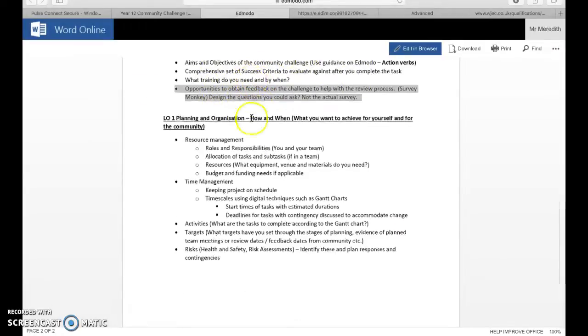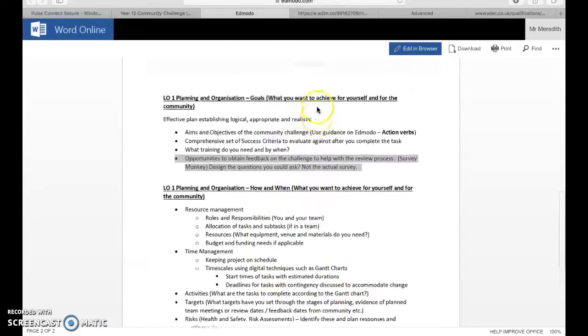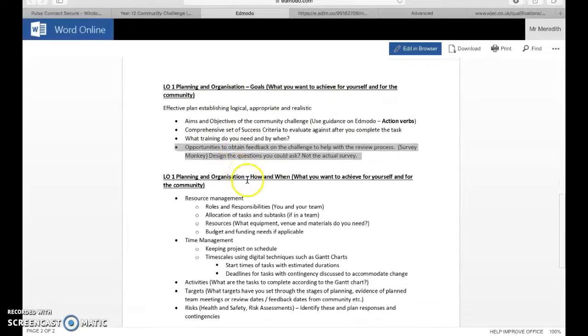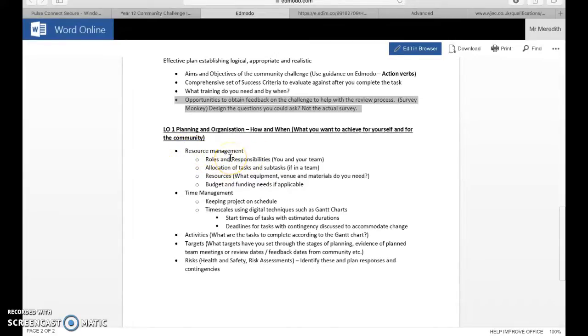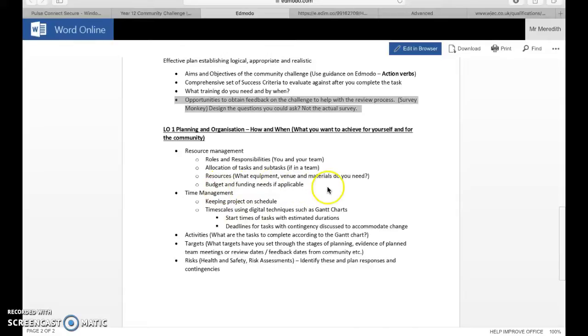Those are the goals basically. These are what we want from it, our aims and objectives and the success criteria. Then this is more the logistics of how and when you're going to do something. Things like allocating resources. What do you need? If you're coaching football, do you need a pitch? When do you need that pitch? Who do you need to speak to? When do you need to do that by?